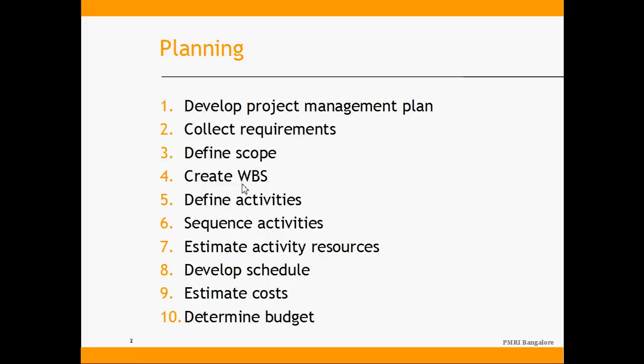Once the scope is defined, it gets decomposed further into a work breakdown structure, which we'll discuss in detail in subsequent modules. Once the WBS is done, those work packages are decomposed into activities. Once the activities are known, we sequence them based on their logical dependencies, estimate the resources required to execute them, develop the schedule, estimate the cost, and determine the budget. The aggregation of cost becomes the budget.